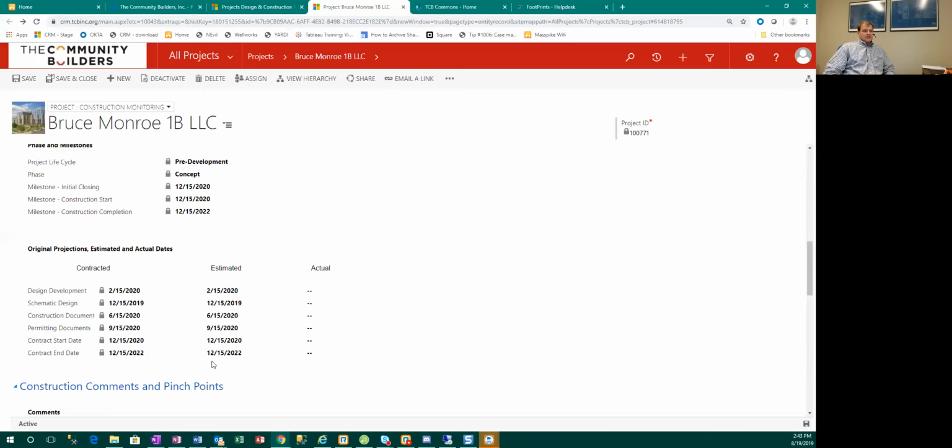So, careful, Rhonda. A couple things. Ivy, let's just pretend that this is AO Flats, right? And we are going to take that 1215 and extend it by 3 months. Our projection now is that this project's going to be 3 months later. We can do that. It's going to flag it that it's behind the contract end date. But if we then choose to approve a change order that says, hey, contractor, we're going to give you a month and a half because of this gas line delay, then we go back and work with the project manager to update this contract end date in CRM so that we're all tracking on the same schedule. We're driving towards that completion date.